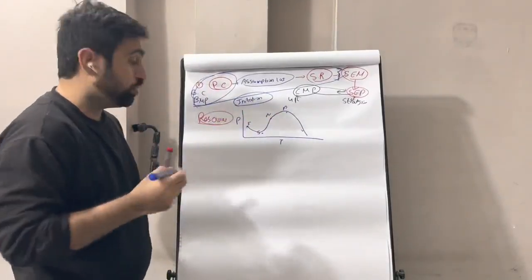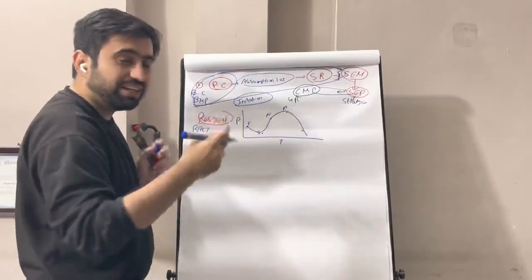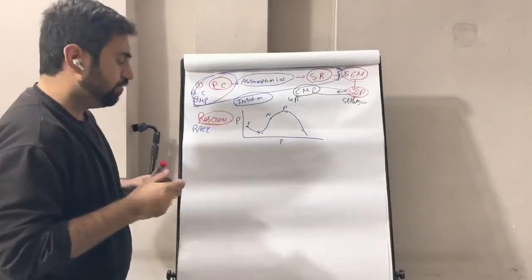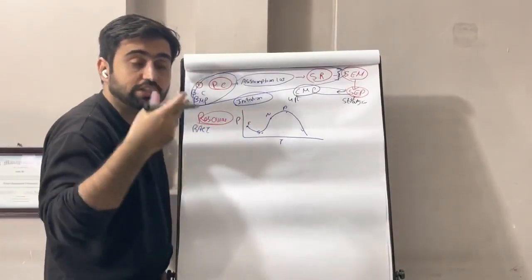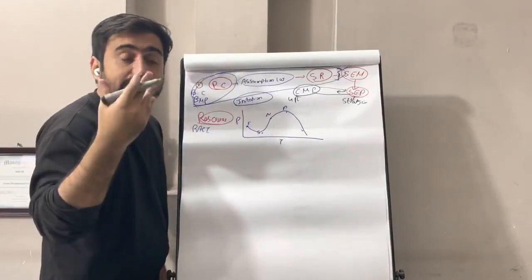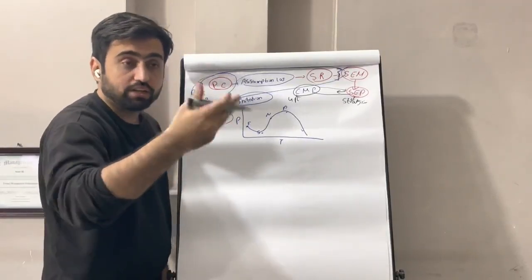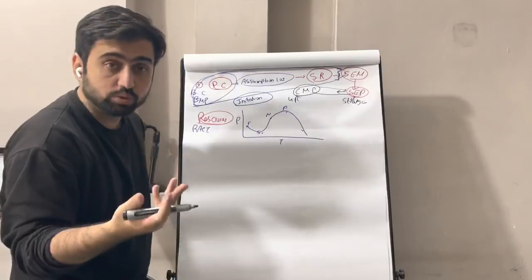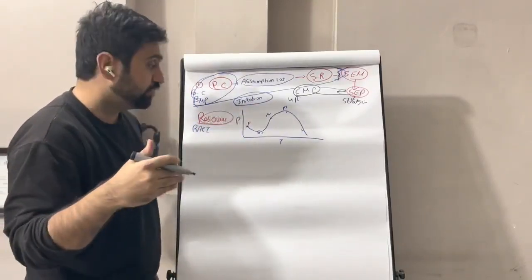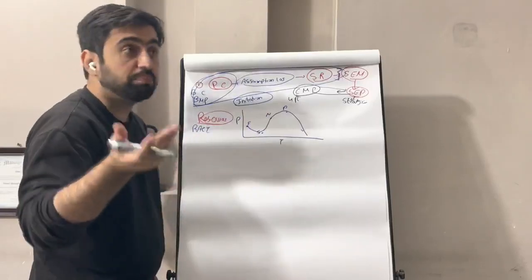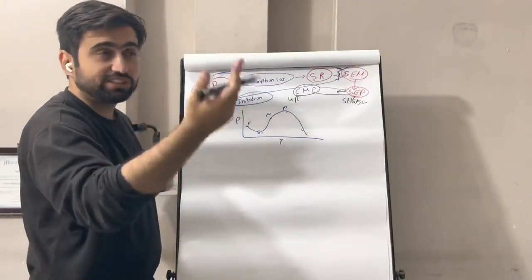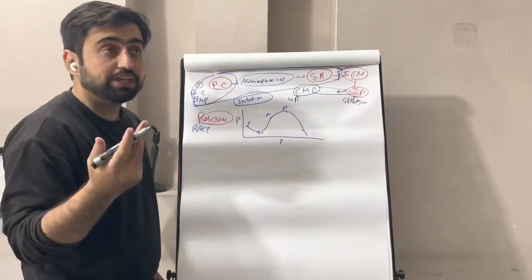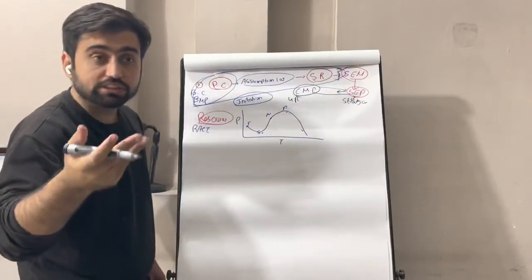In the resource management plan, we identify the RACI: what are the responsible, accountable, consult, inform roles. We identify the physical resources. Do we need physical resources or virtual resources? If we want physical resources, what are the challenges, like accommodation, providing food and utilities, bus. If we want virtual resources, how are we going to handle the global time zone issue, what time it is there, what time it is with you, and how are we going to manage the video issue and the background noise. Every family has background noise, their kids can be there, someone's house can be near the road, near a place like an airport or railway station, and the sound can go through.